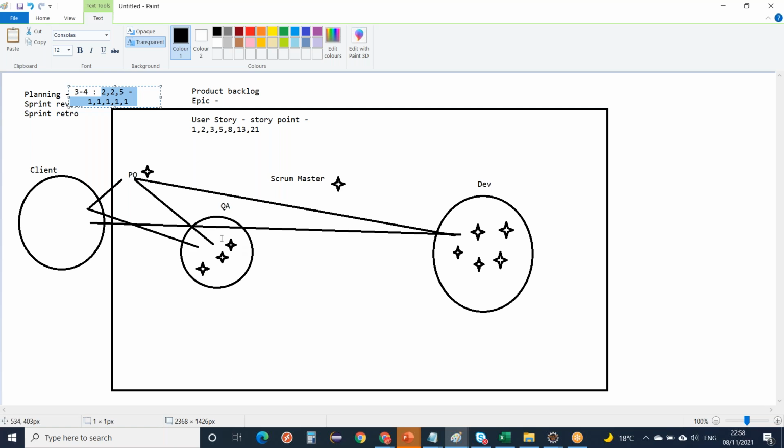And then the people who are closely working, QA and the dev, and the Scrum Master, they will be communicating with the PO that okay, this much is complex, or this much is required, this much effort we need to put into all this. So we need this much time. Okay, so in a sprint we'll be able to finish 3. So that way the communication goes. Okay, so the PO will give us a list, QA and developers will decide how much they can do in a sprint, and then whatever they decide, they finish that in a sprint.